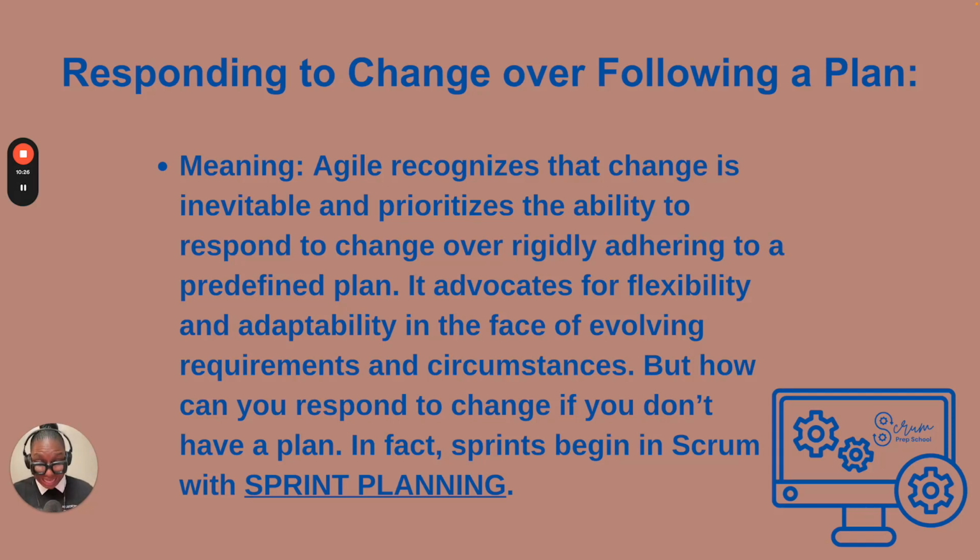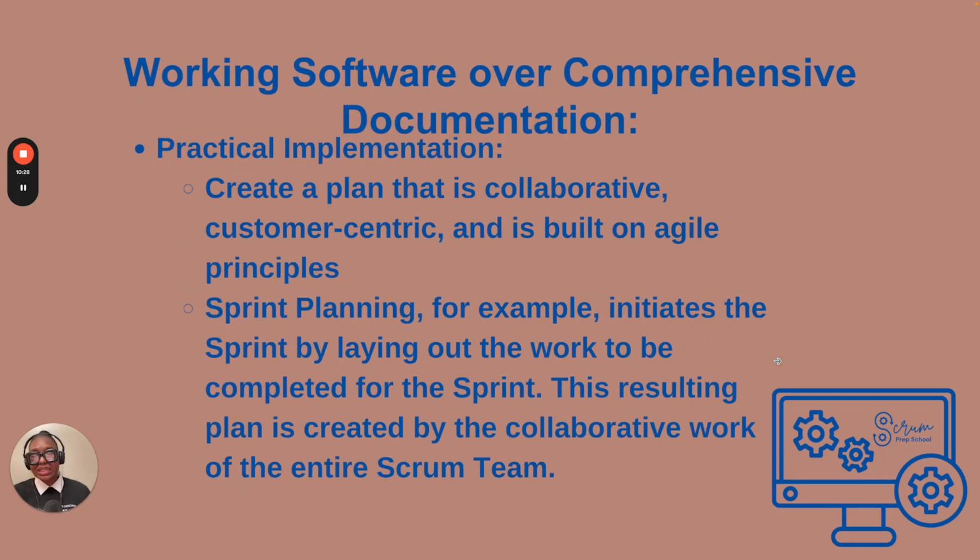Sprint planning. And so one thing that is very practical is to create a plan that is collaborative, that is customer-centric, that is built on agile principles. Sprint planning, for example, initiates the sprint by laying out the work to be completed for the sprint. This resulting plan is created by the collaborative work of the entire team.